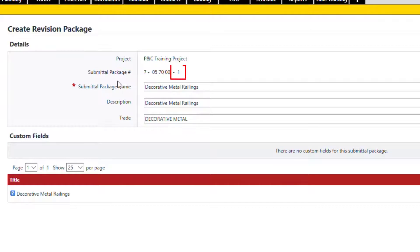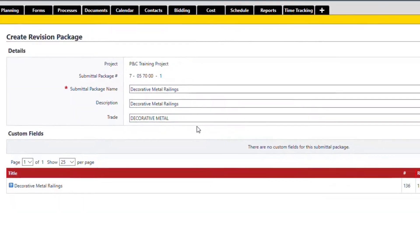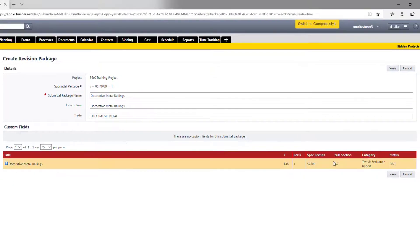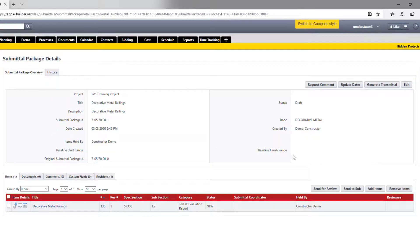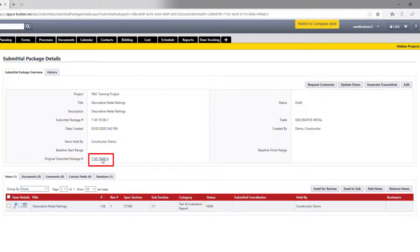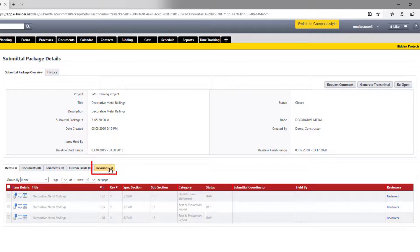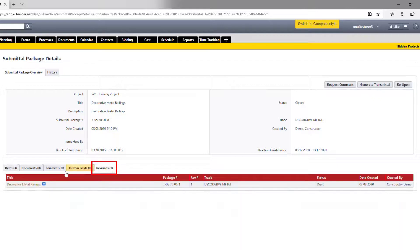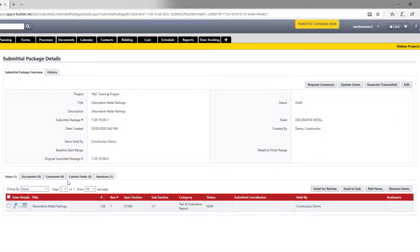If you noticed, the new package is now version one. Click here if you are interested to see the old package. As soon as the new revision is created, the old items are getting closed in the old package. Let's click back here to see the new package.